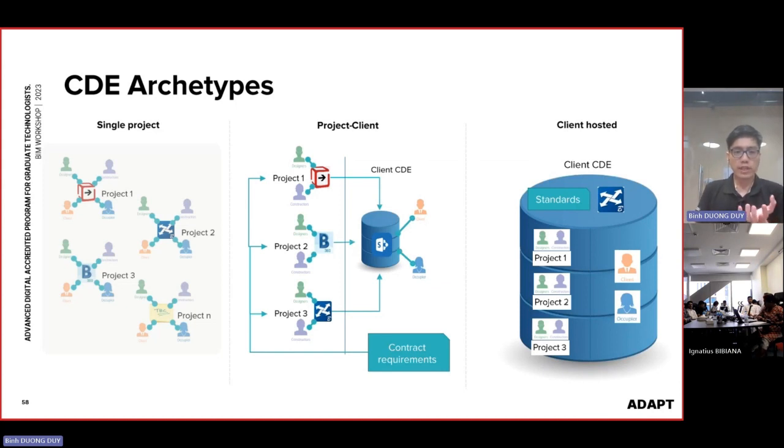So Hexagon, I would consider that project a horizontal project. With a horizontal project, not like vertical, you have to divide the project into small projects, right? So this could be project 1, 2, 3, 4, 5 inside one big project. For this type, you can divide it so every project has one single CDE. Every project works on a different platform.